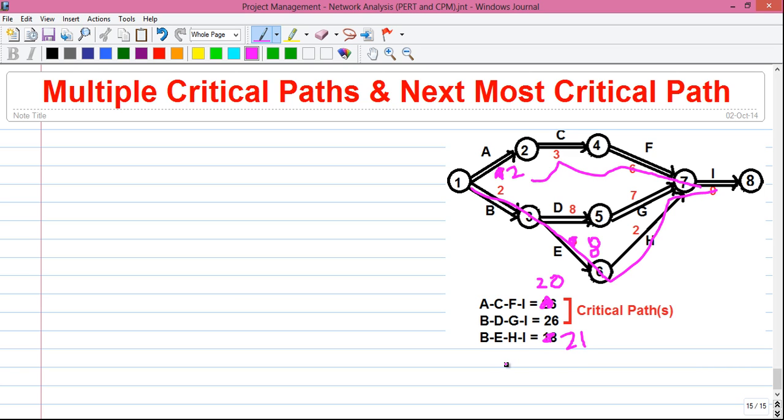So in that case, there will be only one critical path. That is, with the maximum value among 20, 26 and 21, it's 26. So our critical path will be B, D, G and I.